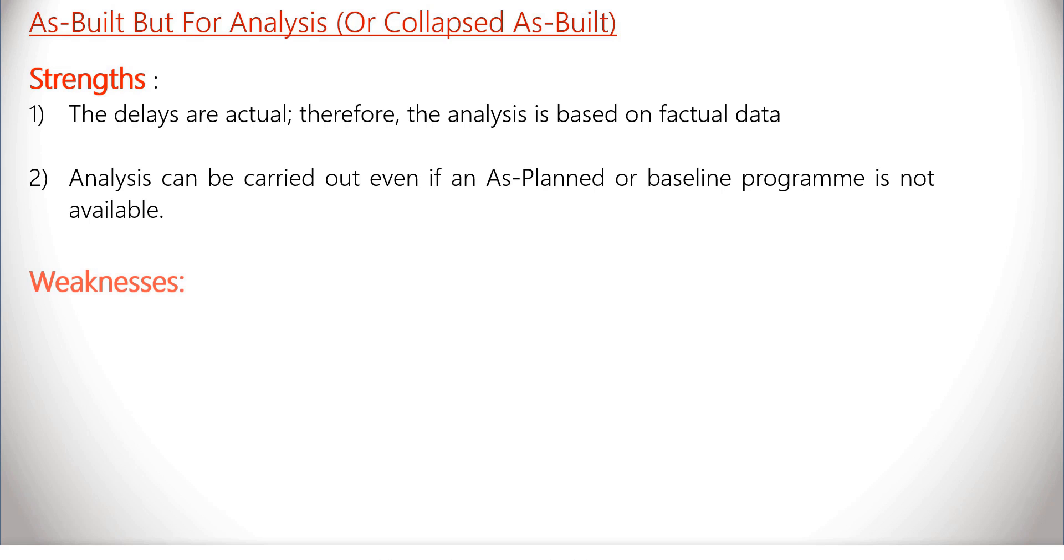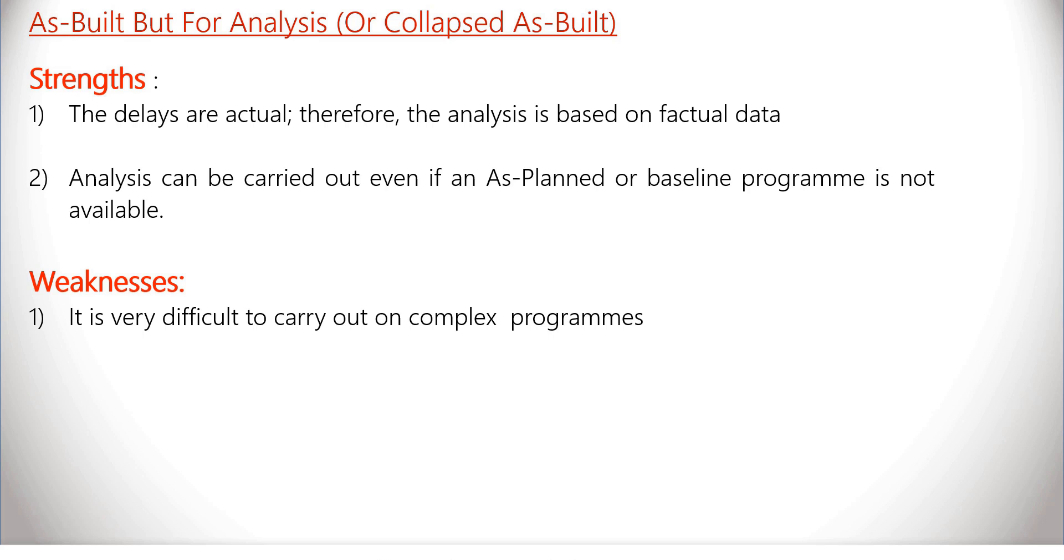So what are the weaknesses? First, it is very difficult to carry out a collapsed as-built analysis on complex programs.